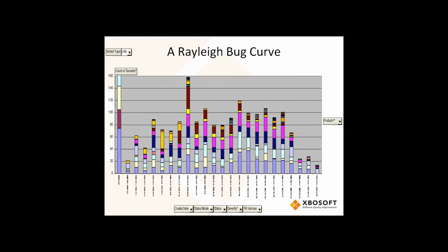Another factor might be if a project is under time pressure and an organization decides to ramp up with double the headcount and try to compress time. Intuitively we would say, clearly if we're trying to compress schedule and throw a lot of people on a project, we'd have not fewer defects, but more defects to contend with as people were rushing, and you would be correct.